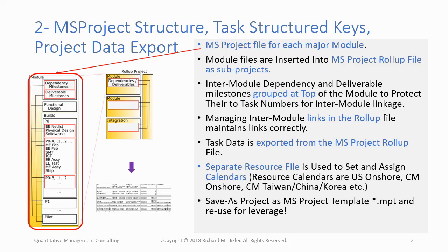First, at the top of the MPP file, a section for links in, meaning dependencies, and a section for links out, meaning deliverables. This will help linkage among GANTTs, as I'll show shortly. Even if there are multiple GANTTs in one MPP file, there should only be one dependency and deliverable section at the top of that file and covering all GANTTs contained below it in the MPP file.